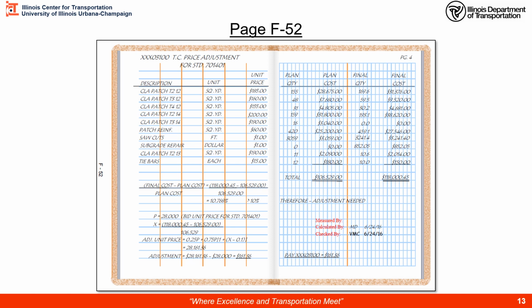And of course we had a unit price on the bid, a planned quantity, so we have a planned cost for these particular items. Now notice here we have one that's a 0. There was no planned quantity for subgrade repair. So if you have any work being performed under 10904, extra work, you need to add that in if it was behind the protection in this effort.